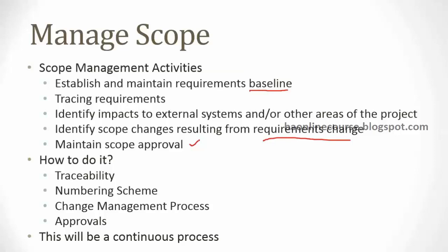Make sure that you get all your requirements, what is documented in your BRD, formally approved. That means the client is either sending out an email or taking a hard copy printout and then signing it on the paper, right? Make sure that you adhere to that organization's standards and get that approval. Similarly, when some requirement changes also, you'll have to agree on the change request which has been coming up, right? Otherwise, you'll not be able to back up or defend your documents, whatever you have developed. So you'll fall flat, and then the customer says, I didn't approve. You go back and change it now. So you'll have to change it.